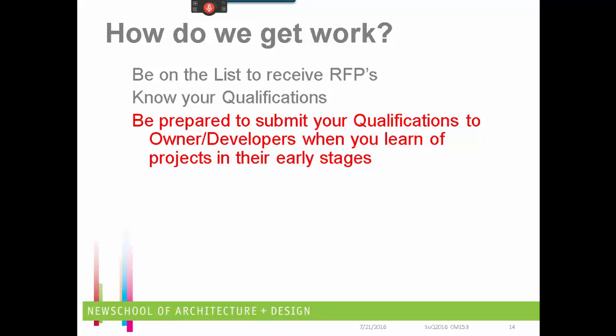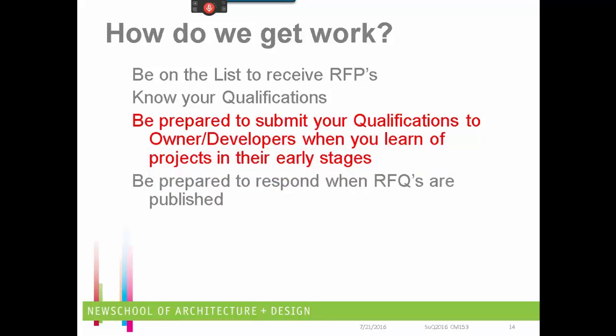So remember, in the last slide we talked about that you have to be a qualified bidder in order to get the RFP. So quite often what happens is a project architect will submit a document called an RFQ or publish it in a place of general circulation, such as ENR, Dodge Business News, Dodge Construction, several of these different places that have the ability to reach out to the community and solicit RFQ information.